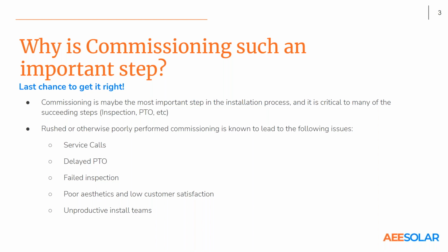Is that one of the biggest drivers for customer satisfaction is the time between install day and PTO, and everything you can do to decrease that time. Well, one, it's money in your pocket because you're getting paid more quickly, but two, higher customer satisfaction. Absolutely. And then finally, unproductive install teams.